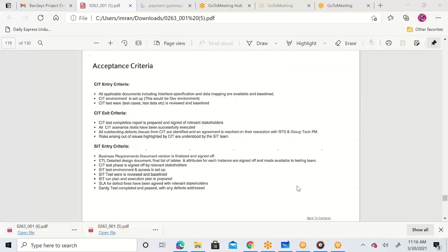What happens if there's a defect in the UAT? How do you handle the situation? I know how to answer it. Straightforward, you can answer that, okay, you simply have to communicate, raise that defect, follow the life cycle, all those. Don't answer it like that. What they are expecting from you is for you to tell them that we do not go with defects in UAT. If we go into UAT with defects, any defects which have been deferred, we communicate to the user team that we are going into UAT testing with these two or three defects, or one defect. So you don't need to test that function yet. Once that has been finalized and fixed, we'll give you a notification and then you can test it.